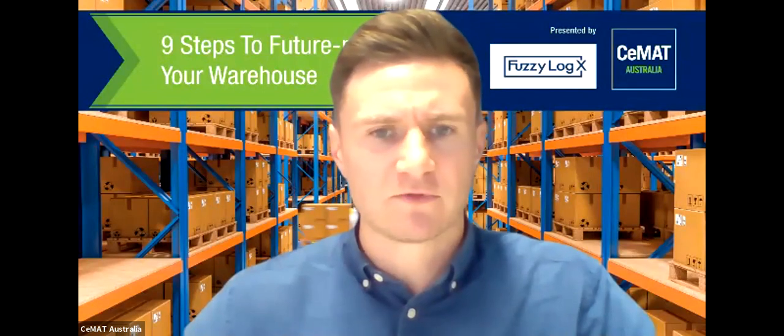Yeah, absolutely. And when do you actually think this project will be finished and ready to be used? Well, we're targeting, well, we won't make this Christmas, which was always the plan. COVID's obviously put a few hurdles up in terms of getting equipment to site and also getting the right people to site. That's all being worked on. So we're looking at hopefully January, February. There are also some external factors outside of our control which are limiting our ability to accelerate at the moment, but we're doing everything we can to mitigate those challenges.